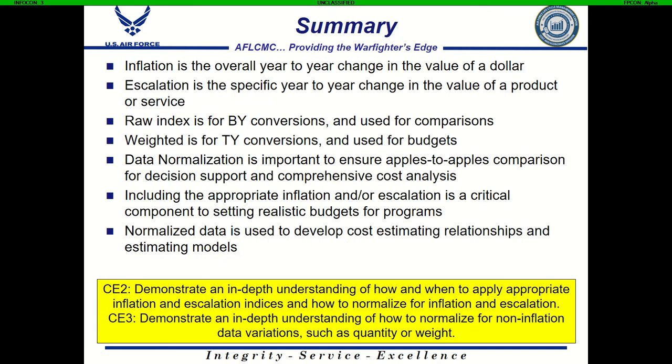In summary, inflation is the overall year-to-year change in the value of the dollar. Again, this is a top-level, economy-wide type of thing. Escalation is always a specific year-to-year change for a product or a service. So again, it should always be labeled what the commodity is, what the product or service is that the escalation rate is for, in order to make sure its application is done properly.